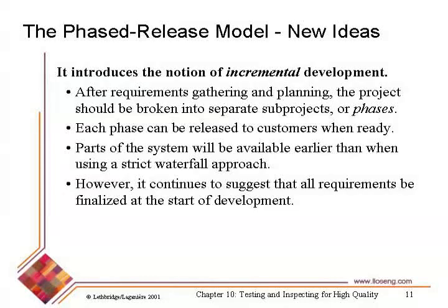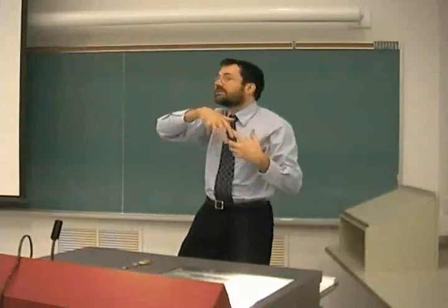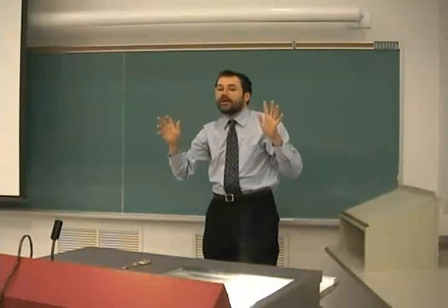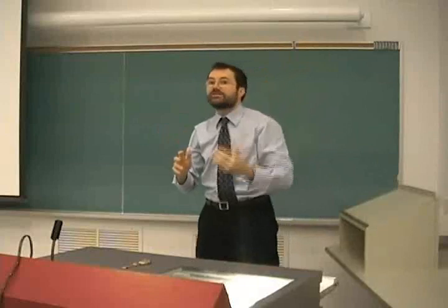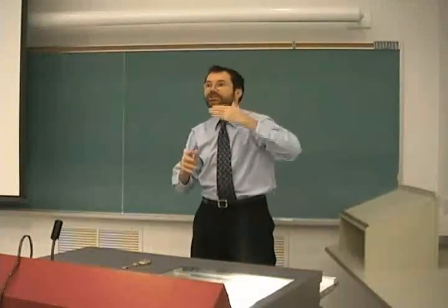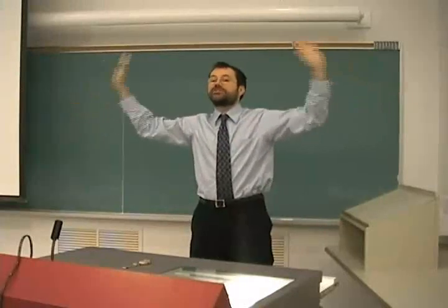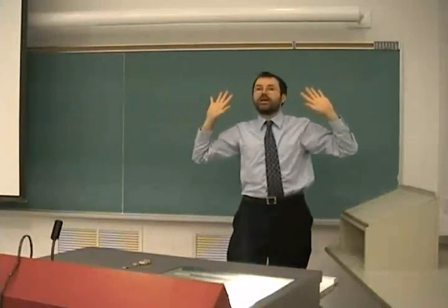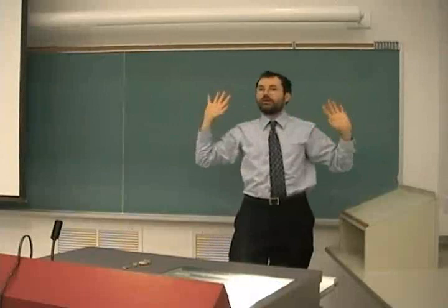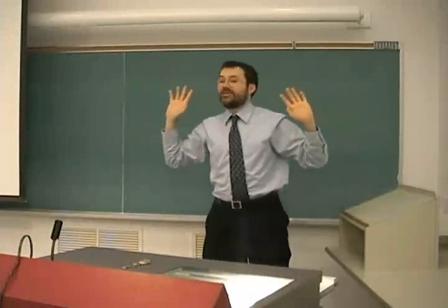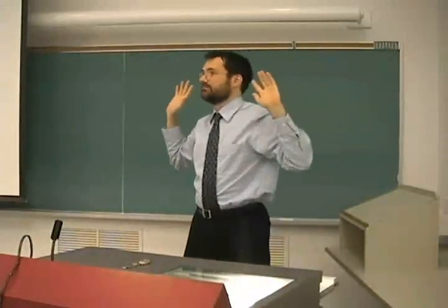If there's big defects or big problems, they're going to be able to tell you earlier. A lot of systems have failed in the following way. They've been developed for 4 or 5 years maybe, from requirements to implementation. Finally, the implementation is complete. Everything is perfect. Then it goes to the customers. And the customers say, oh, all kinds of problems, here, there, and everywhere. The entire system is rejected.